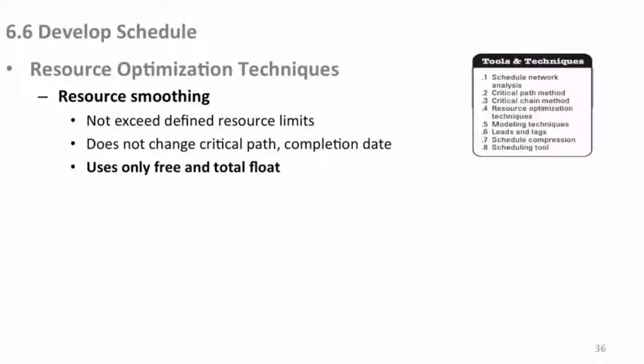But the concept here is this is how you resource level. So now they're all happy, they work 8 hours a day, they can go home and have a nice time, come back the next day and do the remainder of their work. They may not care that the end date's pushed out a day, but you do, and we'll see about that.